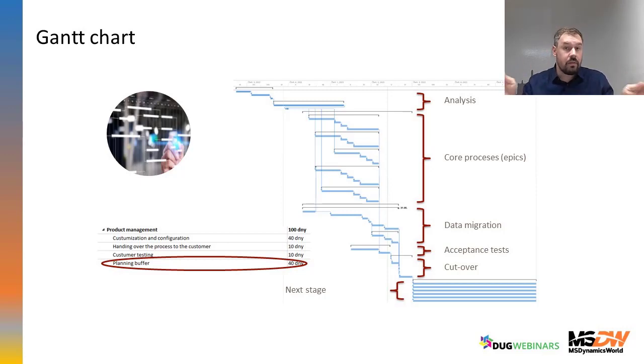So we have 40 more days to still finish it in time. Usually the buffer of the last process is shortest. The buffer of the first can be very large, and this is the basic tool for how to plan the process after process schedule.